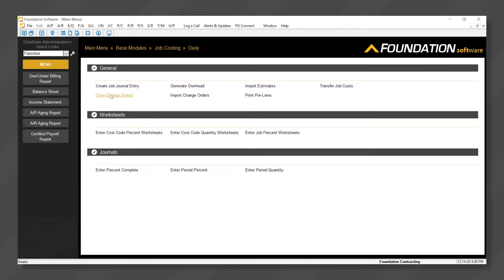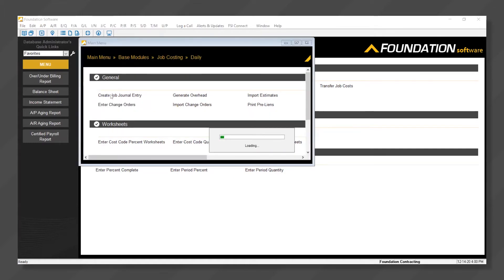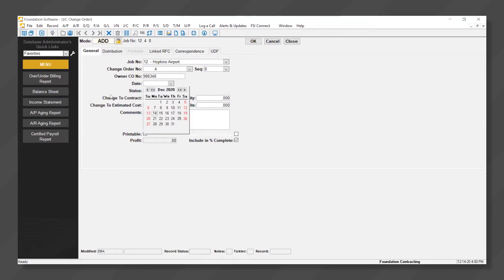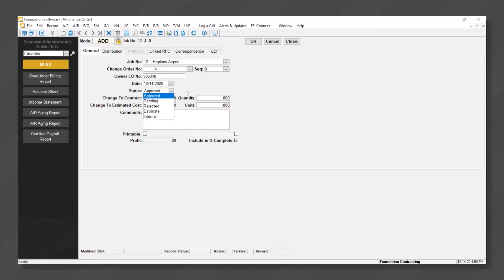In this example, we're going to enter a new change order for job number 12. We can provide an owner change order number, we can date the change order, and we can select the appropriate status. Foundation provides various statuses including approved, pending, rejected, estimated, or internal. In this case, we'll use approved.